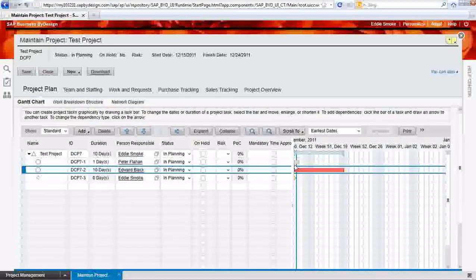The system right now thinks the whole project is going to take 10 days to complete because we have 10 and then plus this 1 day of this task. The system thinks that we're going to be doing both these tasks at the same time, but this task right here cannot be completed until this one is already done. So what I need to do is actually click on this little box and drag a line to this box, and now it knows it's a dependency.